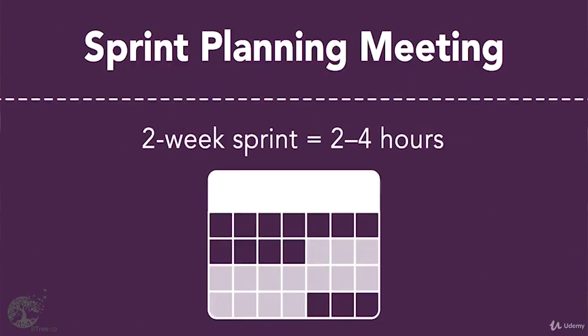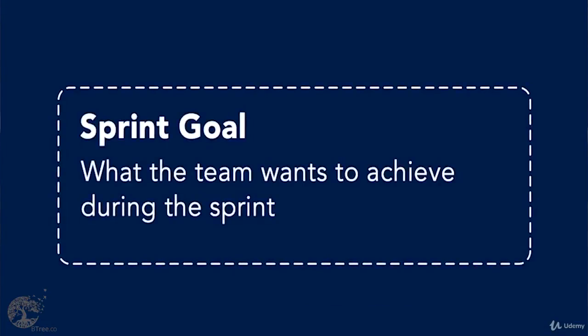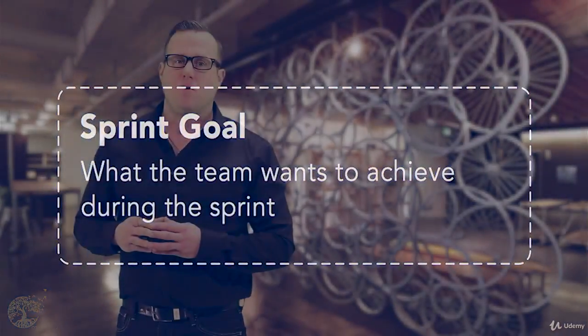Defining a good sprint goal is about writing a 1 or 2 sentence description of what the team wants to achieve during the sprint. Think about it like an elevator pitch. It's paramount that the product owner be a key part of defining this goal, and that we can link the goal to an upcoming release and customer value intentions.